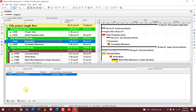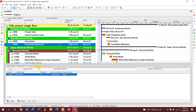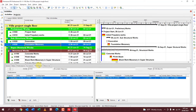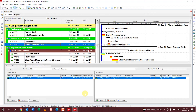You can also assign or remove successors and navigate to them. The Relationship tab shows both predecessors and successors together in two sub-tabs, where you can use the same assign, remove, or go-to method. If an activity has many predecessors and successors, this tab makes it easy to analyze your project schedule and identify any scheduling issues.